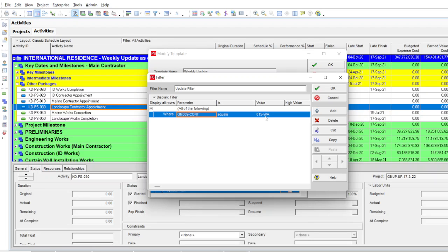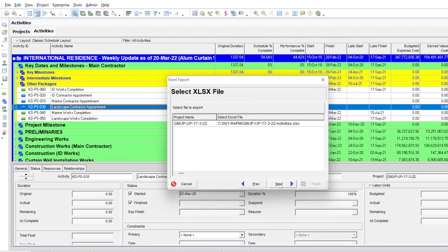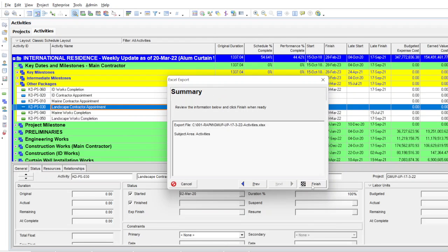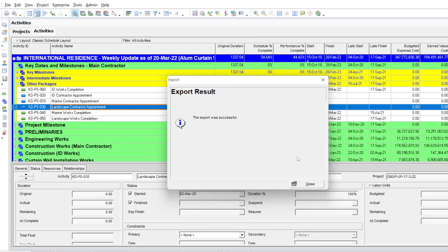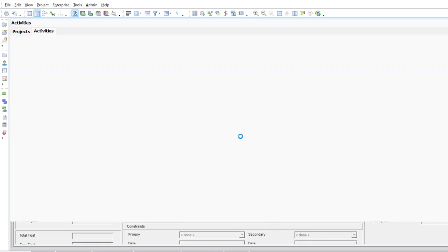And for your update, when you are exporting, make sure whether the subcontractor programs are standalone. If not standalone, then make sure that only the required part is exported, not the whole program. It can damage your master program. I hope you understand this one. And then just press OK, and then press OK, and then next, and then again next, and press finish. Export completed, and this is around 12:04. The aluminum update we get at 12:04. Okay, we close this one and then just open the Excel sheets.